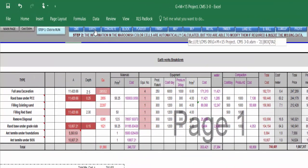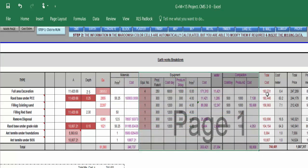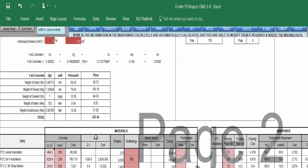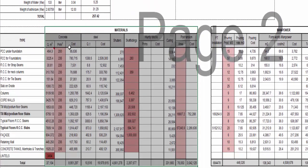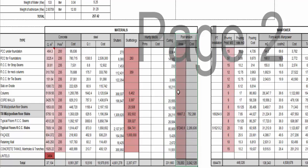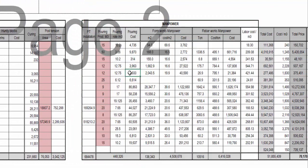The breakdown covers earthwork, concrete, block work, plaster, finishing, and adds all required costs for subcontract and lump sum work. For earthwork, CMS gives all material and equipment costs, and the cost for each earthwork activity. For concrete, CMS gives full cost estimation for material: concrete price, steel, shutters, scaffolding, hardy block if applicable, curing cost, water for curing, post-tensioning, reinforcement cost, and all manpower required for each concrete item — all coming automatically.